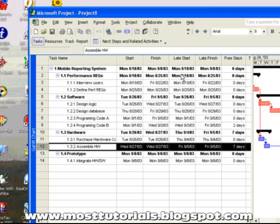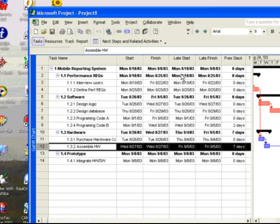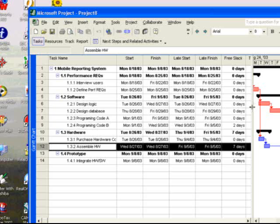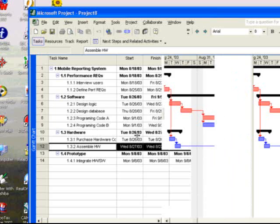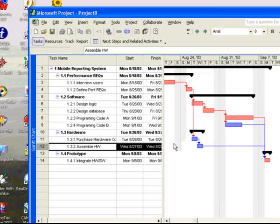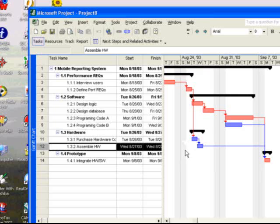One of the things you might want to do is introduce lags to more accurately reflect the nature of the schedule. Looking at our simple schedule, we might say that there's a lag between the purchase of the hardware and the assembly of the hardware - that it takes three days after ordering the hardware for it to arrive to be assembled.